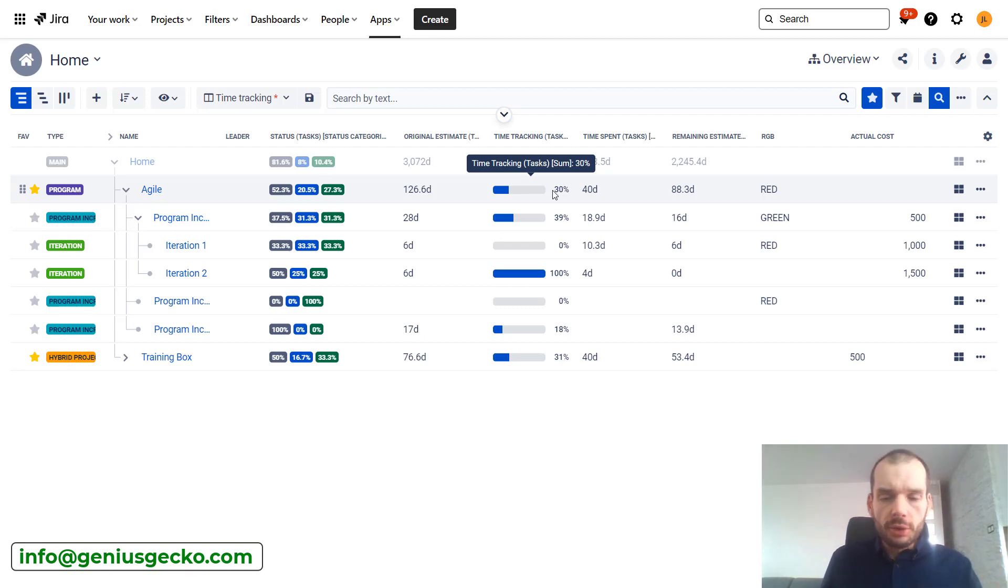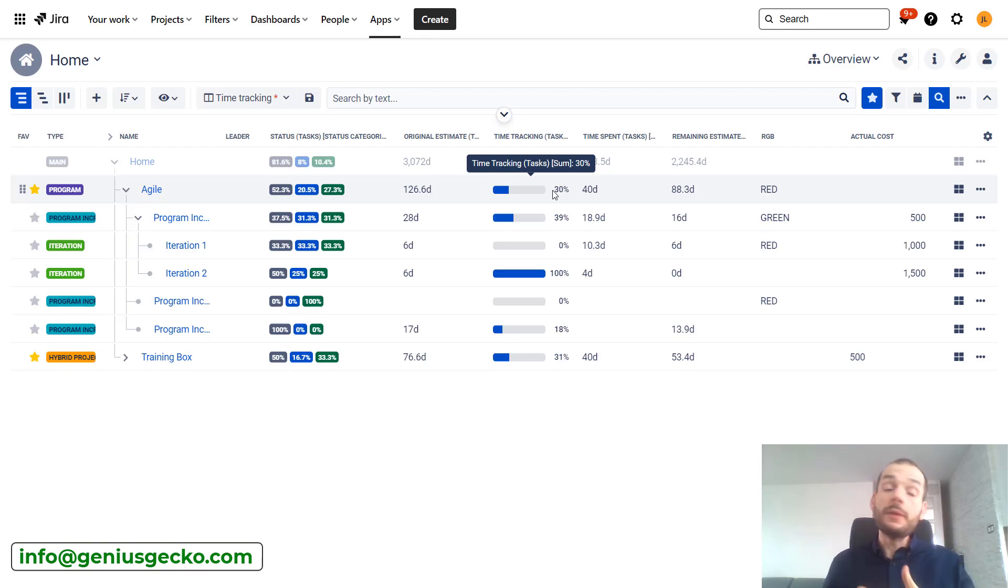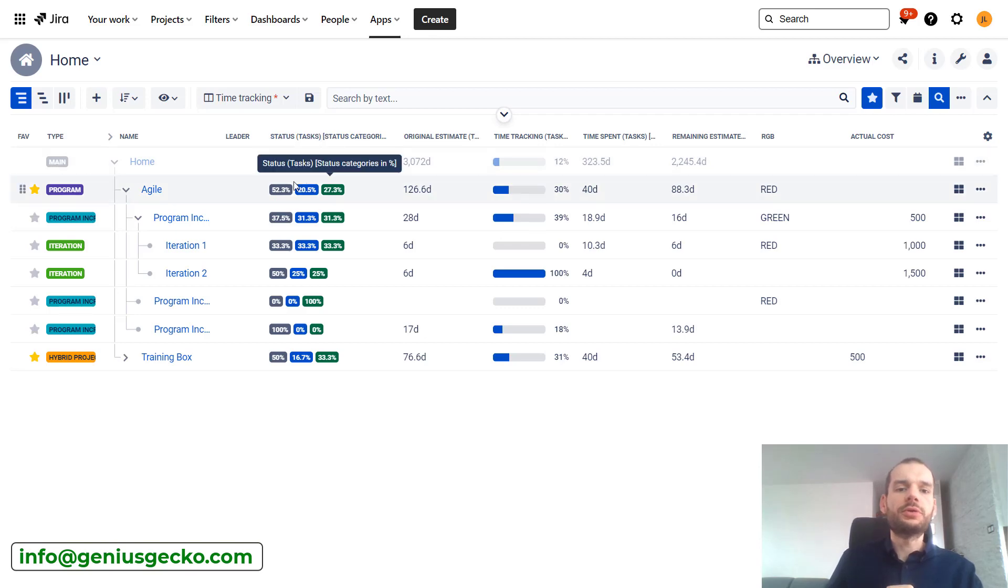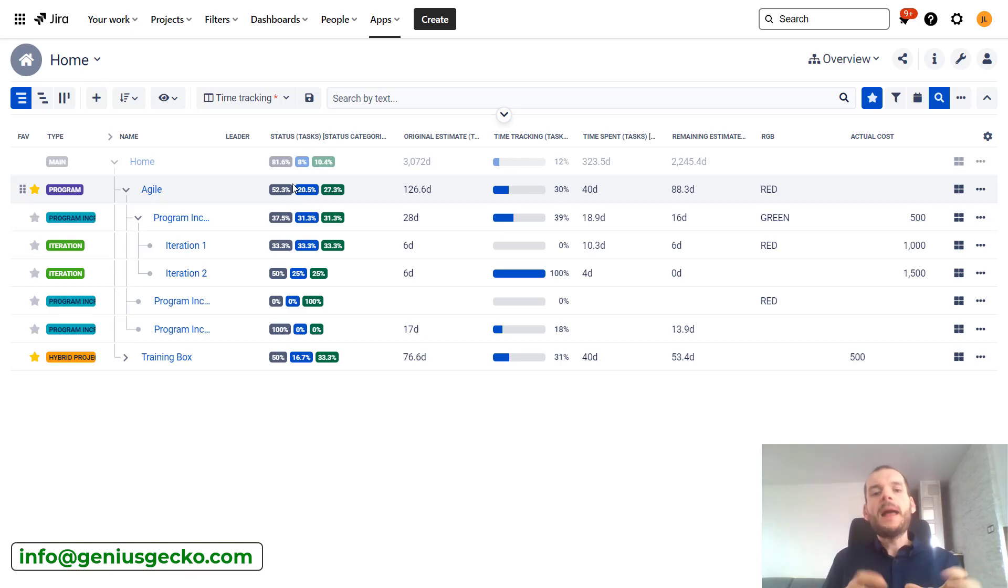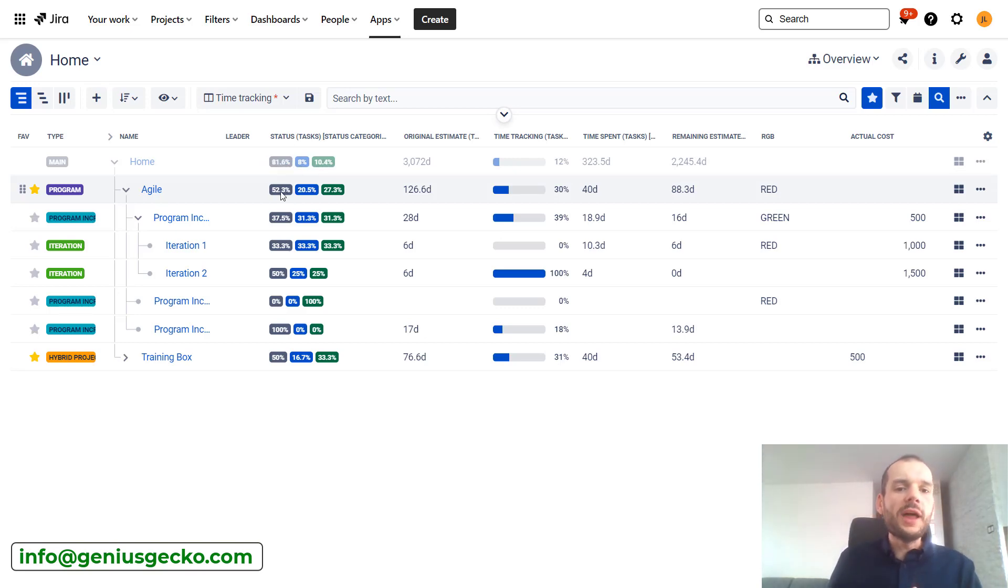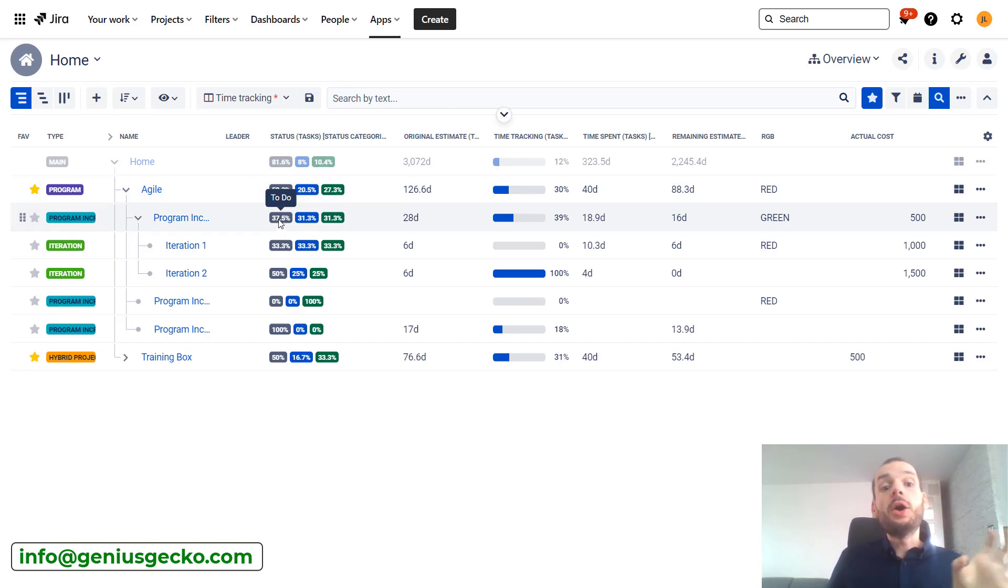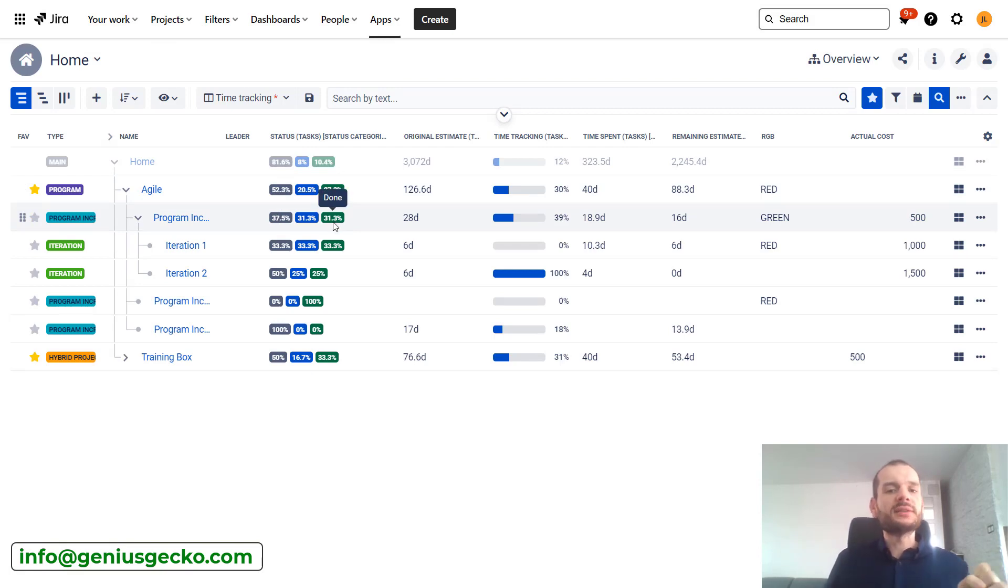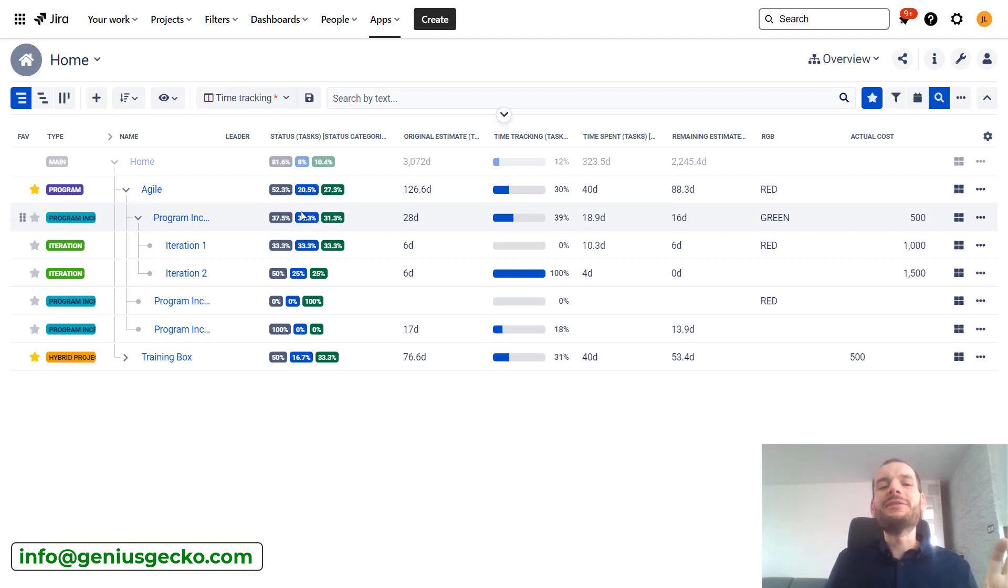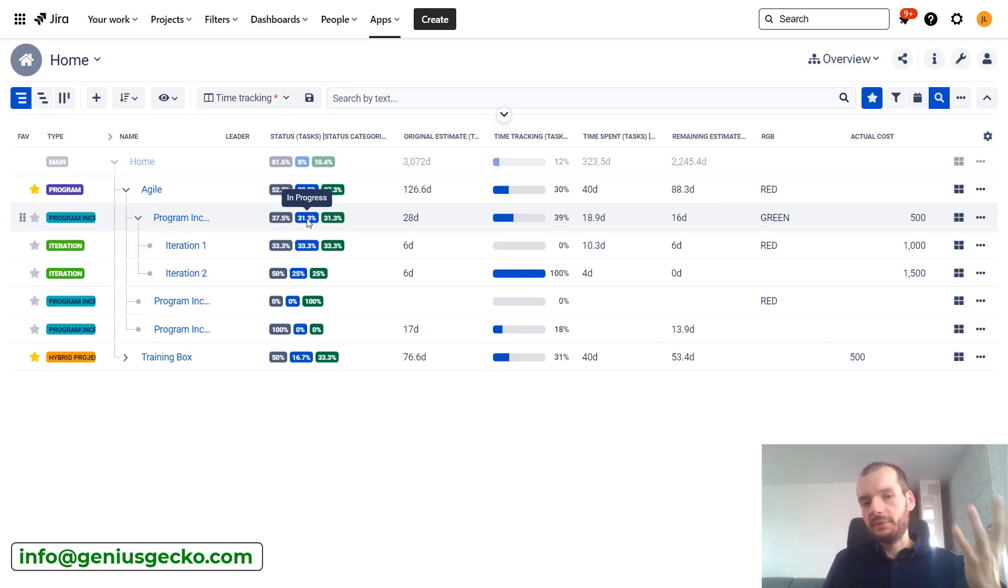If you're not logging work, or maybe you're doing estimates based on story points, there are other ways to track progress. You could see statuses, for example. We see how many tasks within the box are in what status category. We can see that in the whole agile project, 52% of tasks are in status category to-do, but in program increment one, only 37%. This also gives us some indication of the progress. We can say that we're in one third, maybe half of the work done because 31% of tasks are done, 37% to-do, 31% in progress.